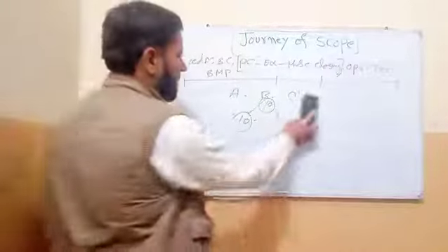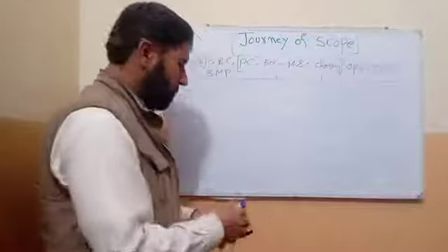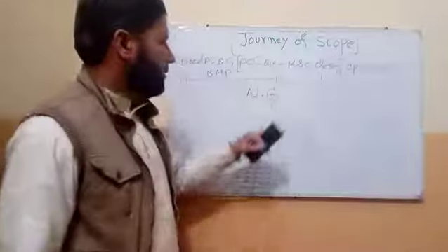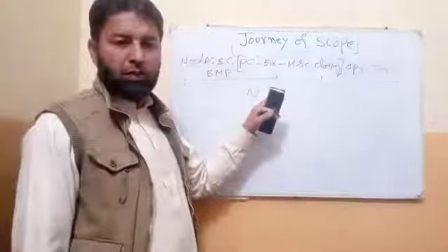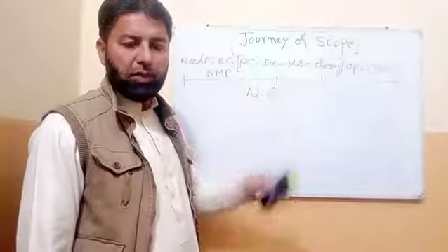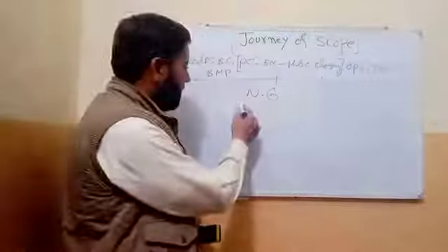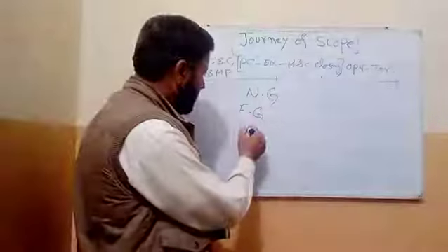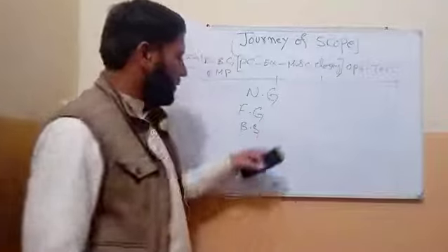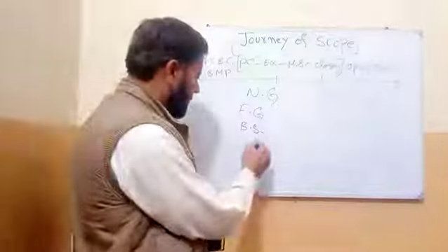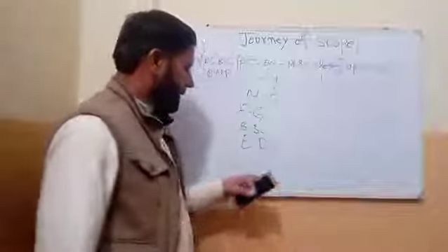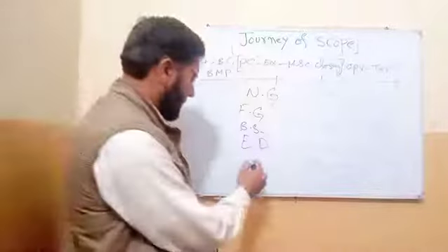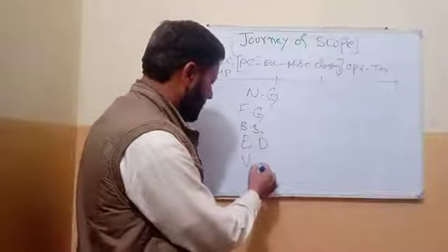And the other technique I will explain to you is the nominal group technique. This is basically 4 tools and techniques used inside the nominal group technique. Focus group came, they generate ideas in brainstorming and we classify those ideas in an affinity diagram and then we rank those ideas using voting.